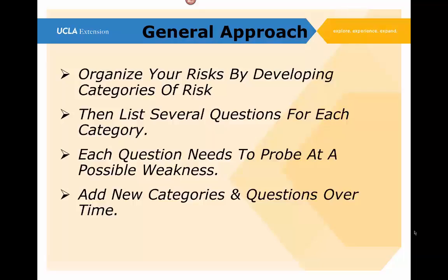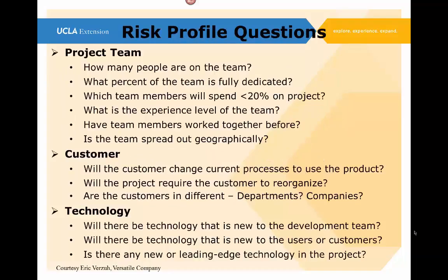As you continue through the process of monitoring your risks from time to time, after you've developed your first set of risks and you've completed your first risk assessment and come up with your risk management plan, periodically, you will review your risks. You will find out which ones are still relevant, which ones may have gone away and you can forget about. You may decide to add new categories or new questions. Anything that helps you flesh out and identify risks for your project really serves you very, very well.